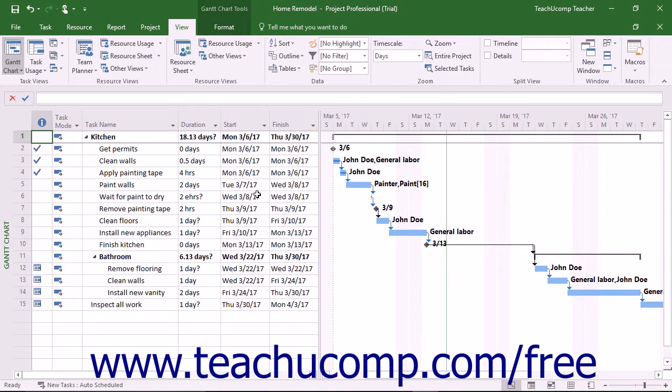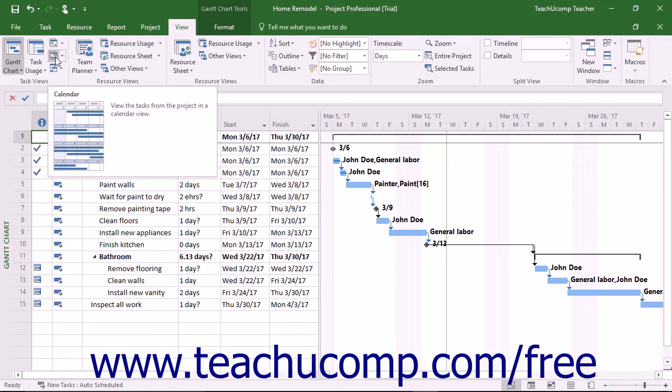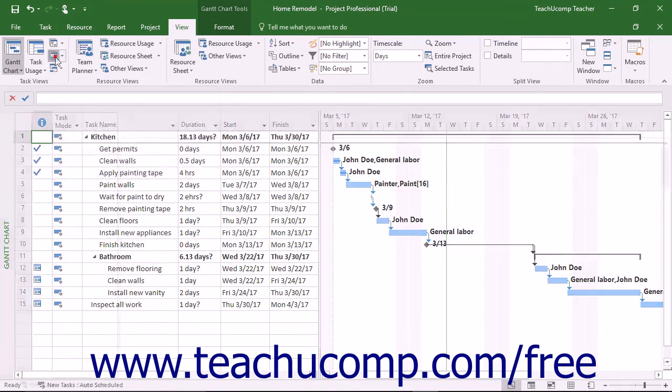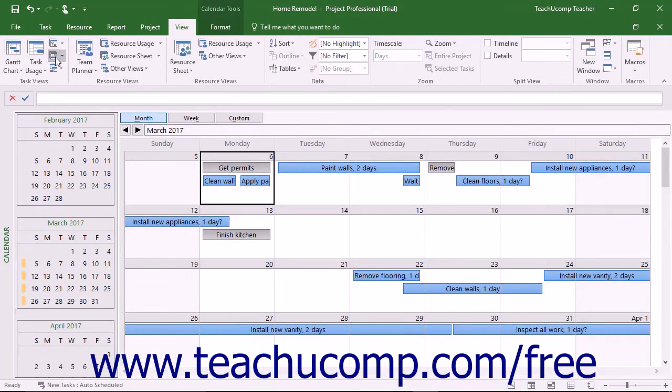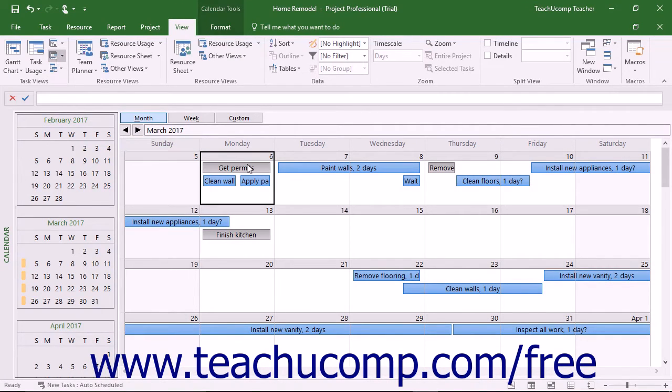To open the calendar view of a project file, click the Calendar button in the Task View's button group on the View tab of the ribbon. Within this view, each task is represented by a rectangle that contains the task name and its duration.